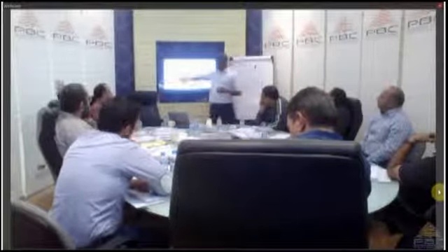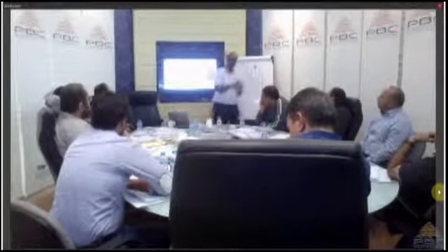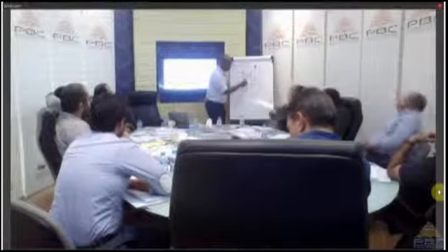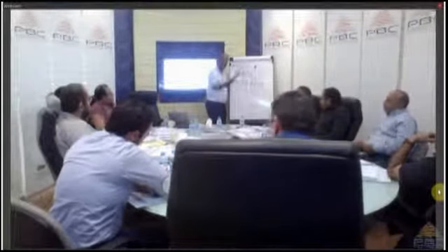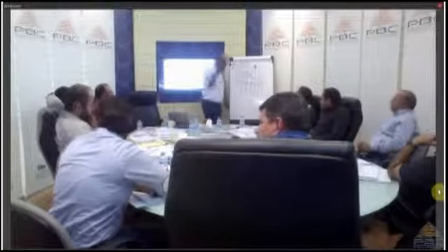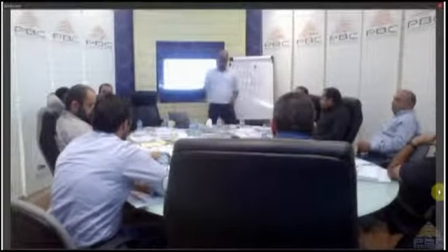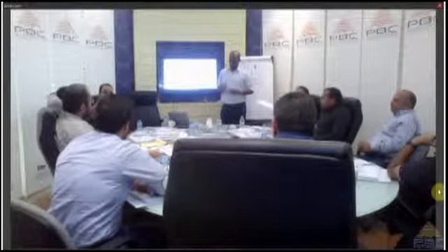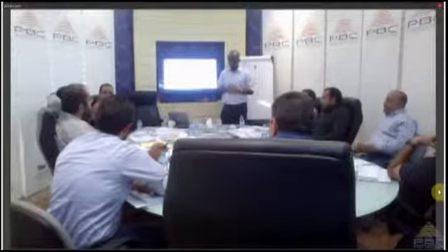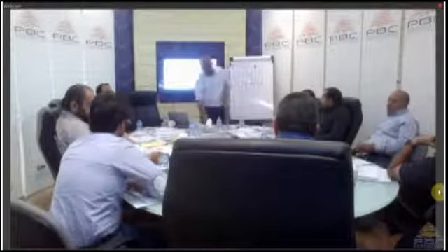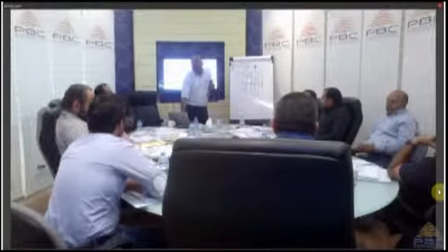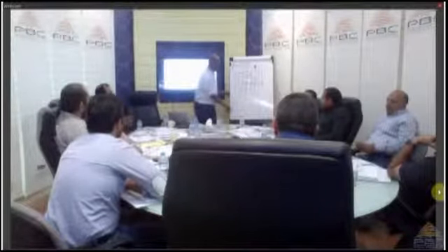Okay. The fourth and last one is milestones. So your activity will be divided into 4 major milestones, or 10, or 20, or 2, or 3, whatever, and then you assign the cost equally to these milestones. If you have earned value, then you can use that. Okay. So establishing your cost baseline.